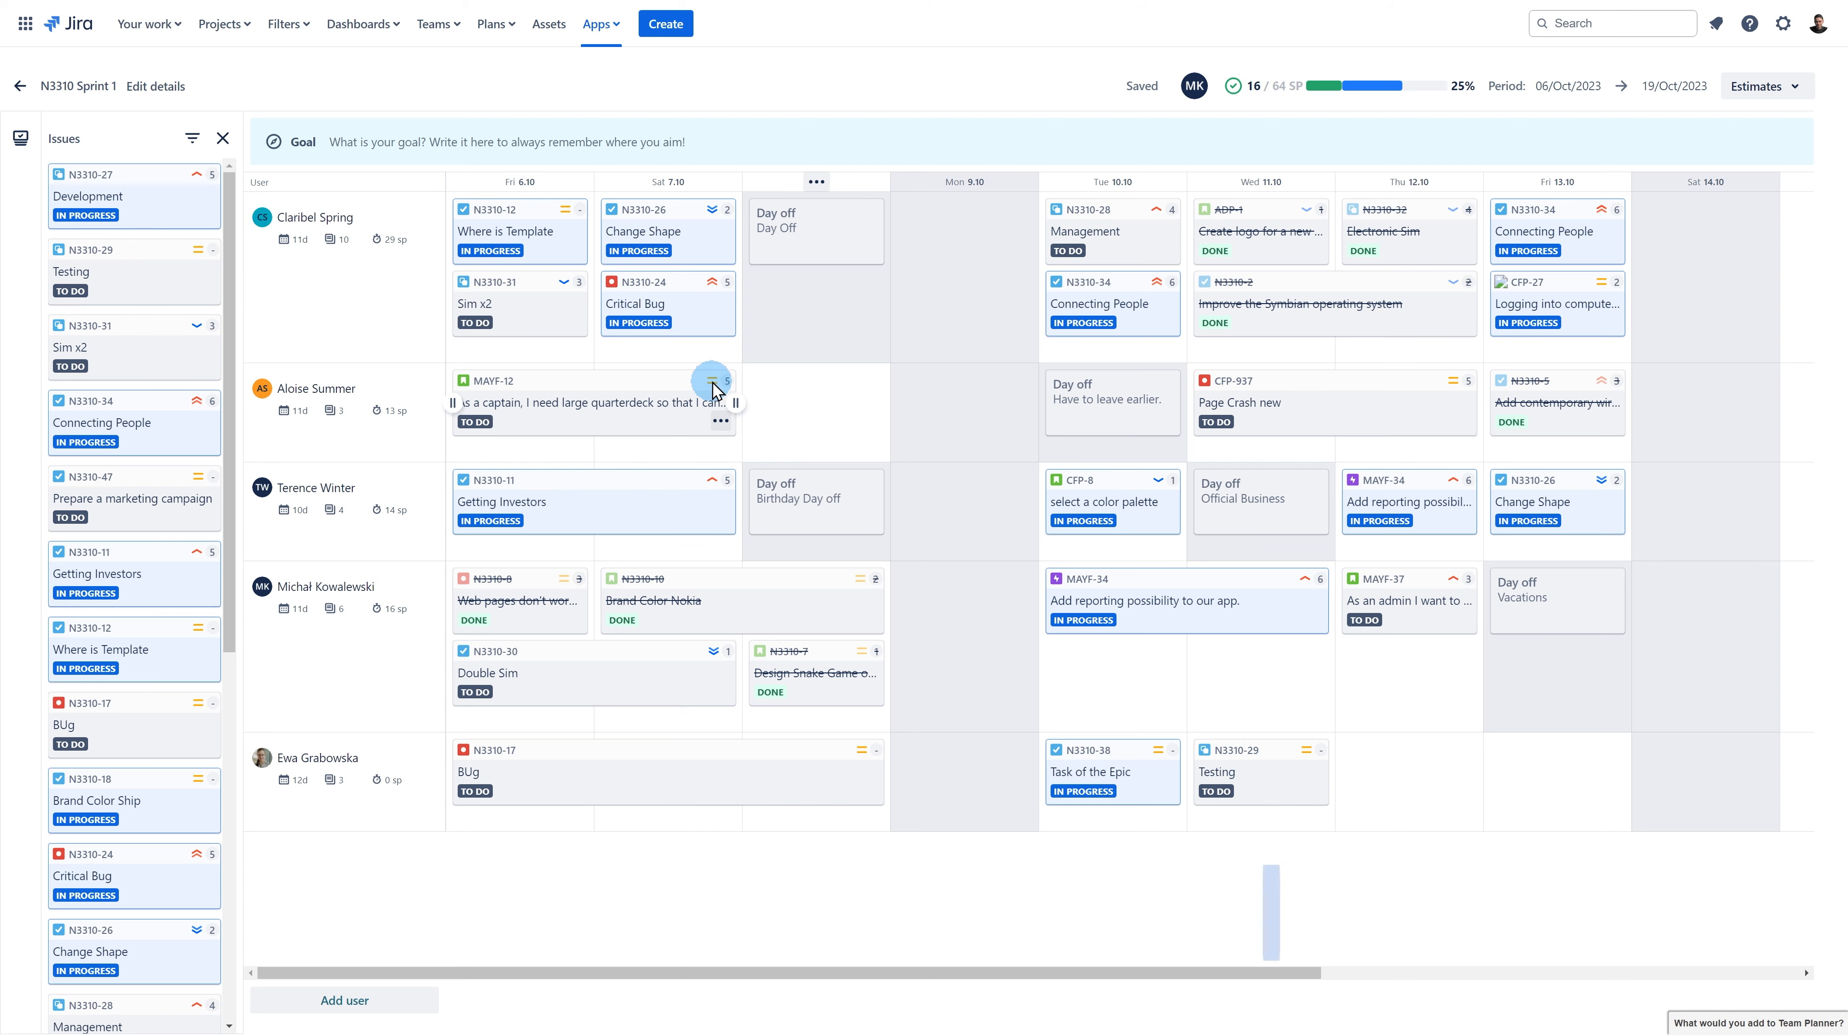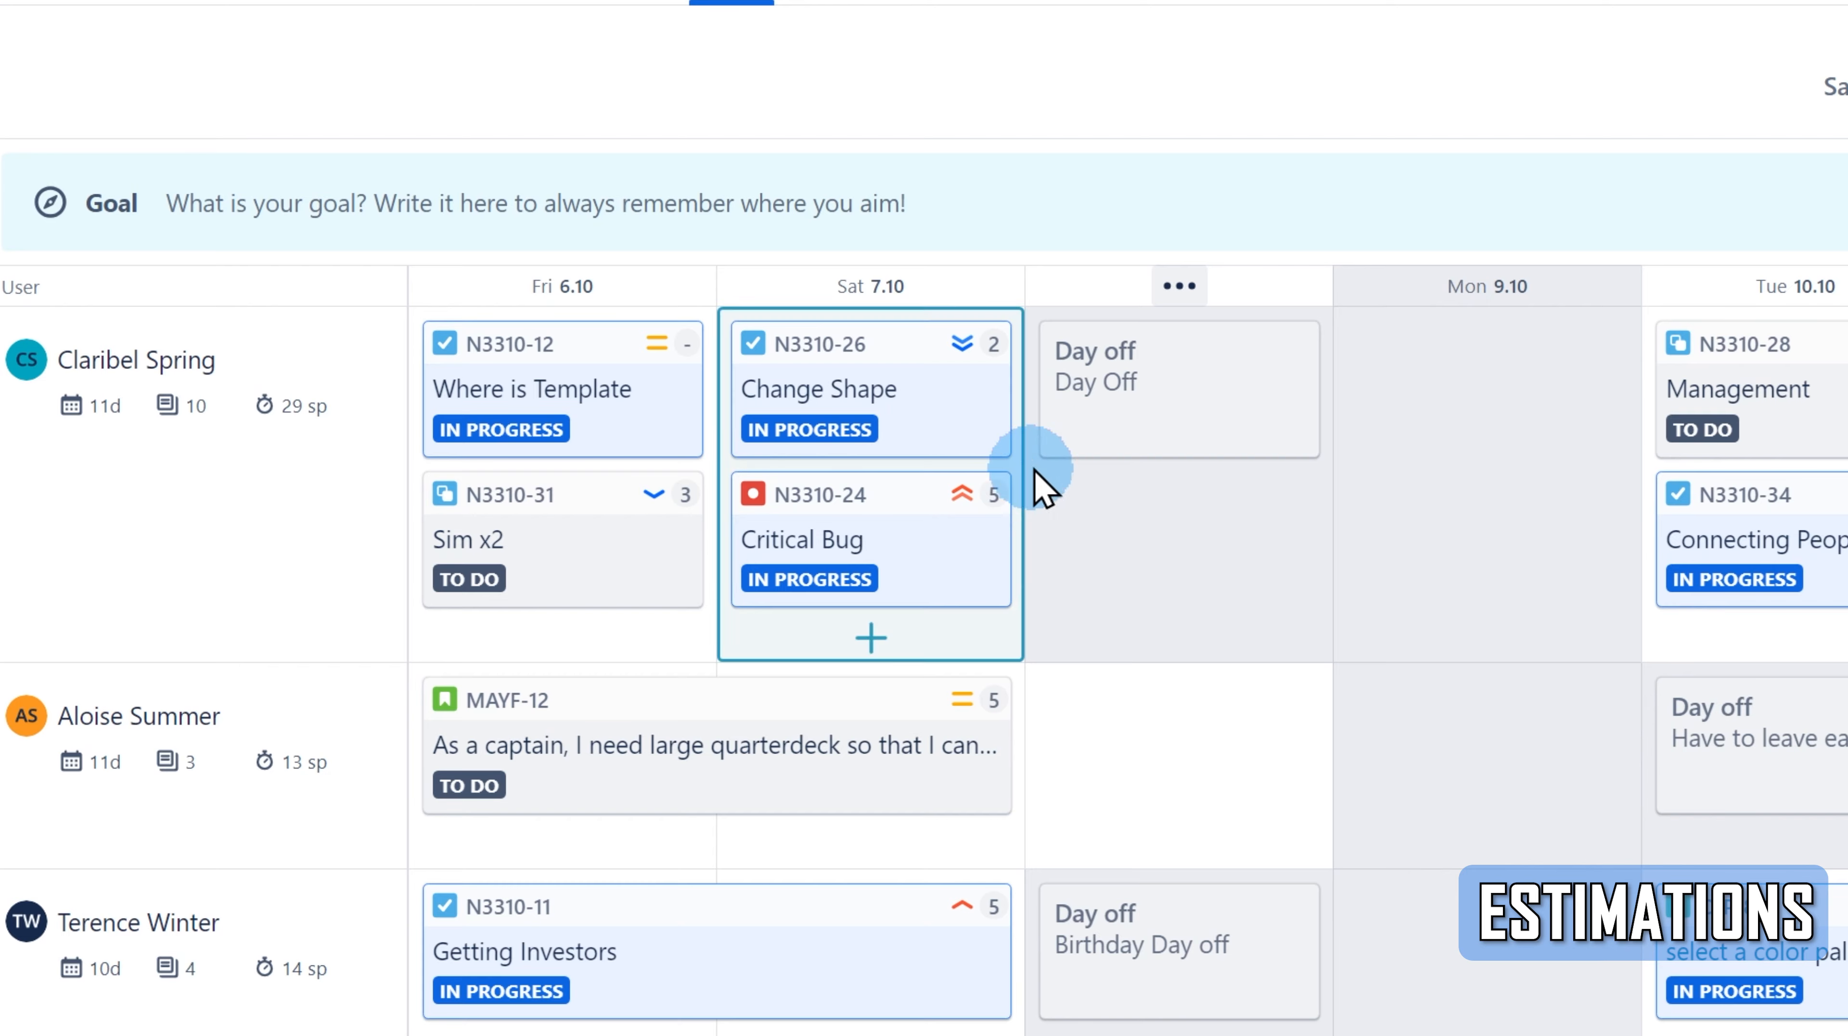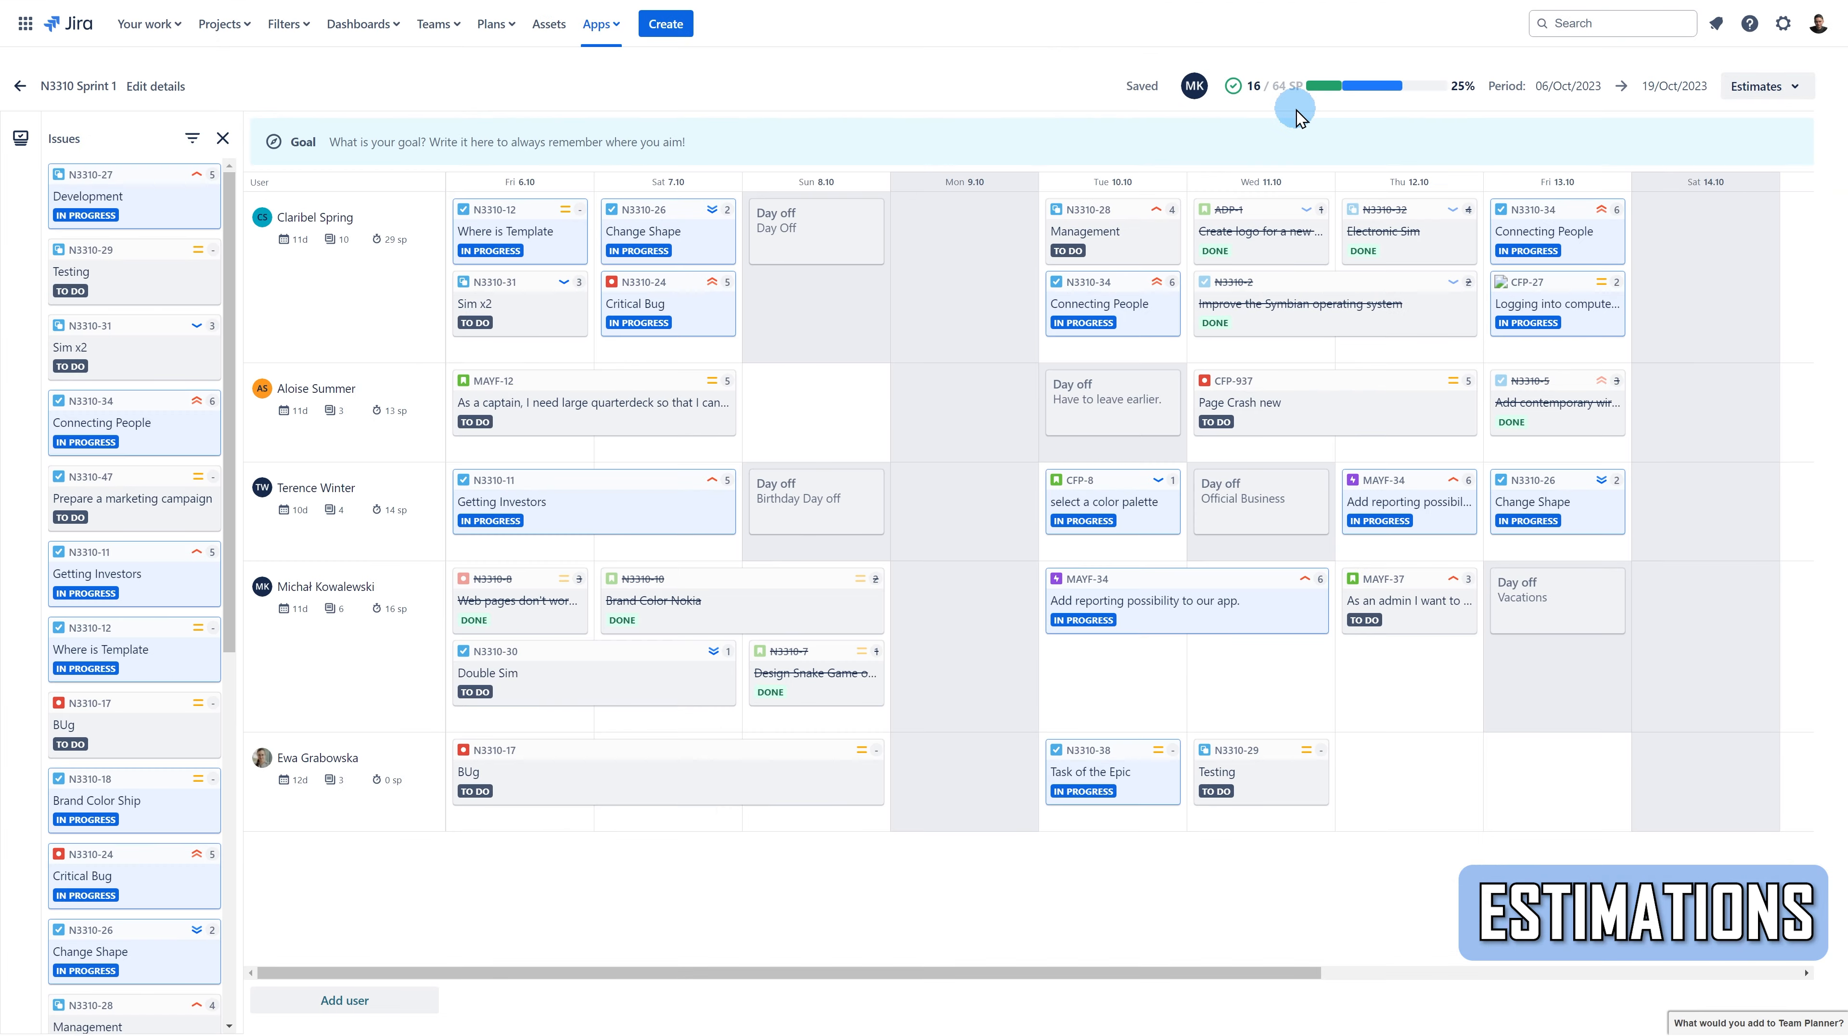You can also display story points or original estimate values to estimate the effort it will take to complete the tasks in the plan. Choose the By Story Points option to display the story points of your tasks. The story points will be visible next to the priority value on the task box. What's more, the app adds up all the points of your tasks added to the plan and displays them at the top. For example, right now I'm displaying story points, and on this plan 16 of 64 story points have been delivered.